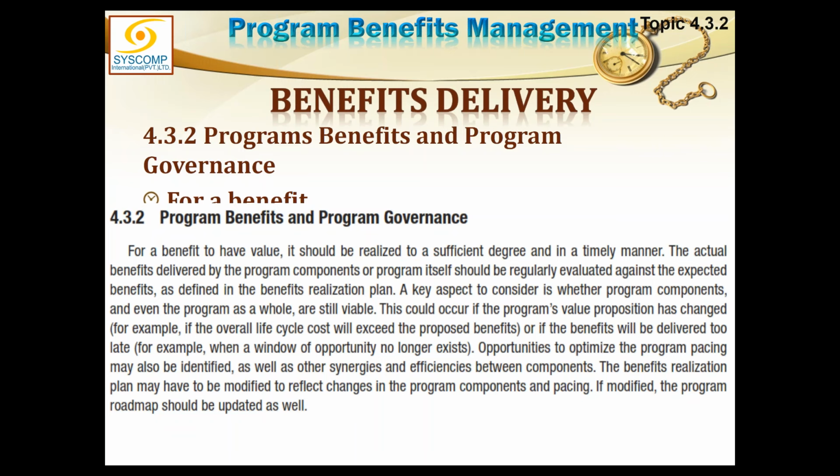Opportunities to optimize the program pacing may also be identified, as well as other synergies and efficiencies between the components. The benefit realization plan must be modified to reflect changes in the program components and pacing. What is the pacing of those, and if modified, the program roadmap should be updated as well.